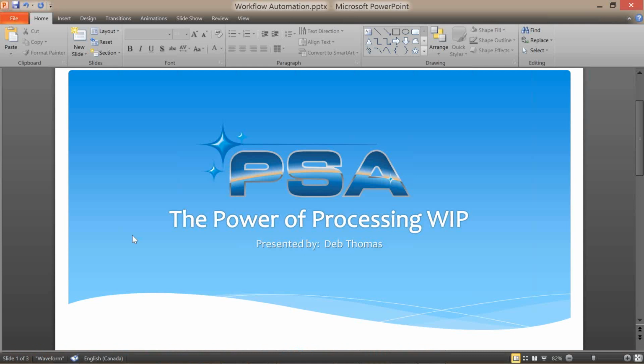We've tried to build in enough safeguards that the system won't let you close a job until after the last financial transaction. So the cost could be April 30th, but if it's processed in WIP calculator in May, you are not going to close it until May.